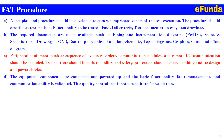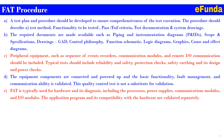The equipment components are connected and powered up; basic functionality, fault management and communication ability are validated. This quality control test is not a substitute for the validation of the system. FAT is typically used for hardware and its diagnosis, including processors, power supply, communication modules and I/O modules.